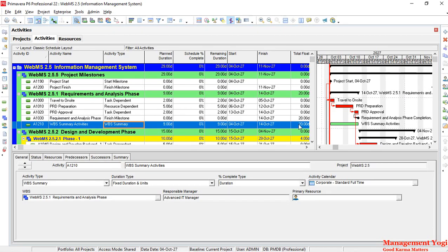So these are all the activity types in Primavera P6: task dependent, resource dependent, start milestone, finish milestone, level of effort, and WBS summary. There is a detailed article published at managementyogi.com — the link will be given in the video description below. Go through that link to understand the various activity types in detail with examples, and subscribe to this channel to know more about Primavera P6 scheduling, formulas, and various activities.